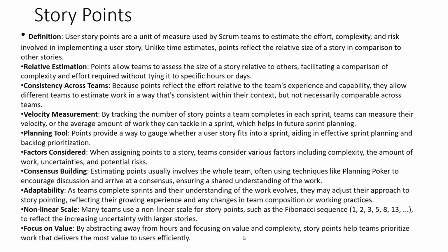Okay. Many teams work on story points in a variety of different ways, and each organization will have their own. I'm looking to do something such as a Fibonacci sequence, and you see that here. I think I have a video talking about that, but it's a set of numbers. I don't think we have to go past 13. If you see a need to, feel free, but look for those numbers and assign one of those numbers. One being the easiest and most straightforward, with 13 being the most time consuming, the most complex, the most difficult to understand. As you go through the assignment this week, try to understand how you would assign points to the given story.